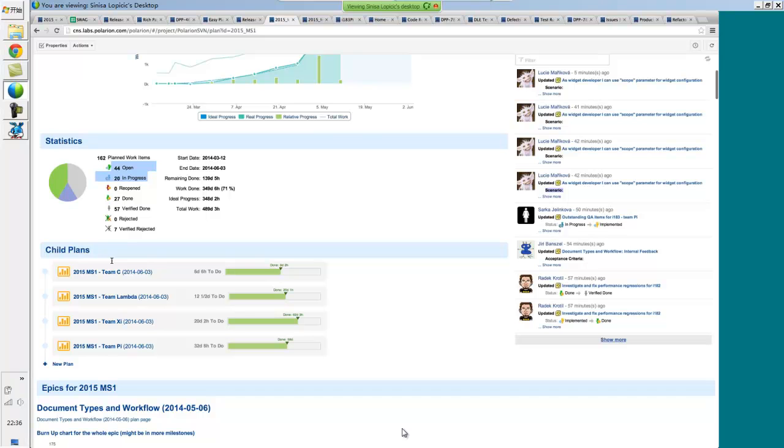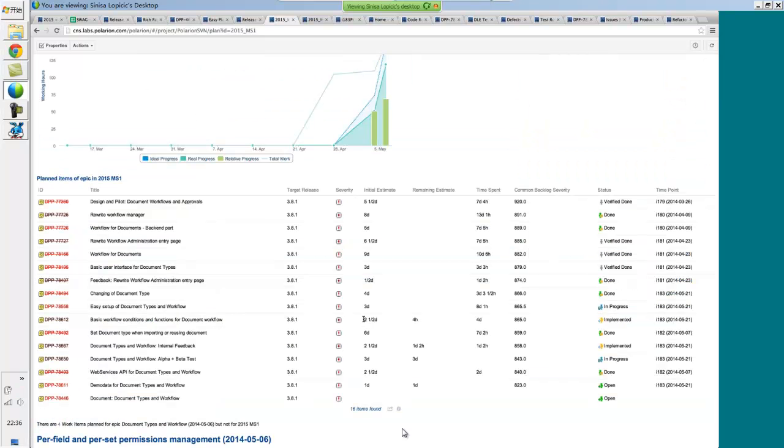And as I said, there's an interesting aspect to it. For instance, look at this highlighted one. The initial estimate was 2.5 days, and 4 days were already spent on it, so it was underestimated, and it has just about 4 hours remaining. We don't usually go into hours, we usually go by around half days, where 4 hours is half a day, around 8 hours of work being a full day. So these are, as I said, the different setups for the different projects that we are working on.